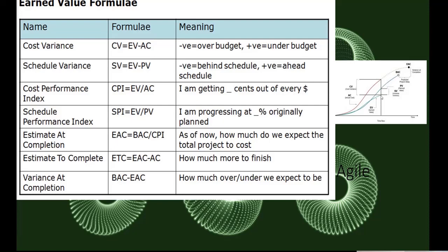For example, in the middle of the year, you calculate that you already spent $3 million, and you calculate that the total budget will be probably $7 million. So how much do you need right now? $4 million, right? So estimate to complete, you need $4 million to complete the project. You got it? Estimate to complete: how much more to finish?